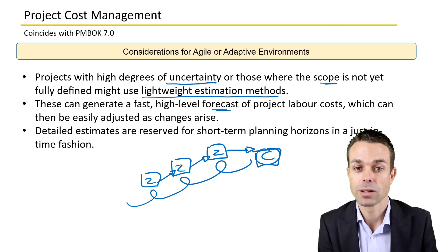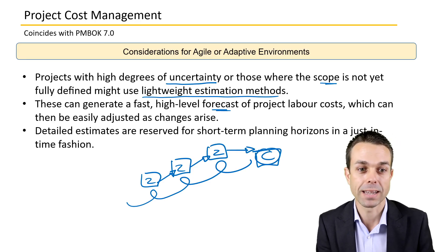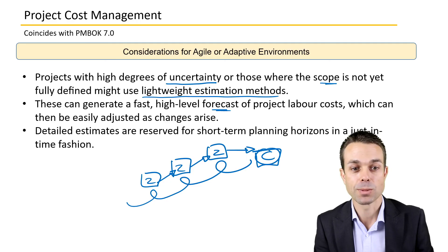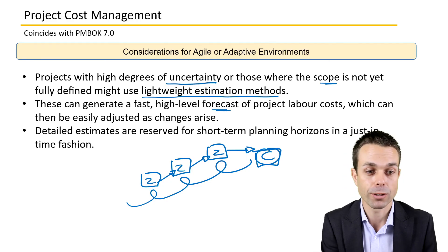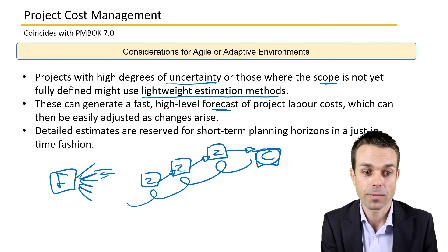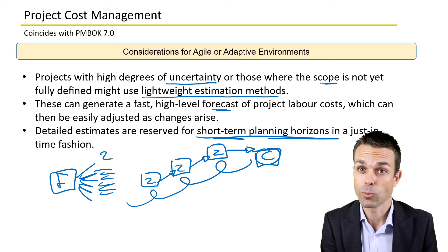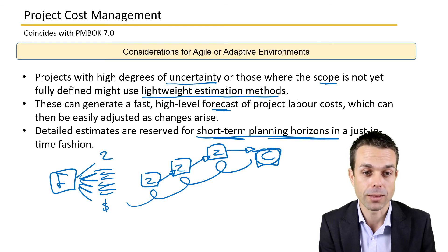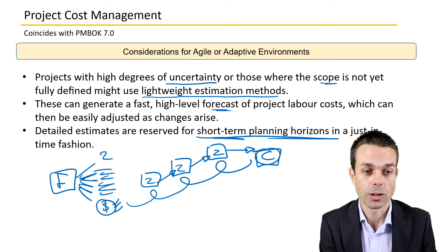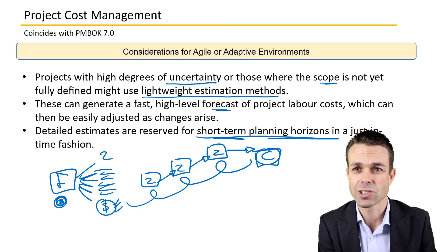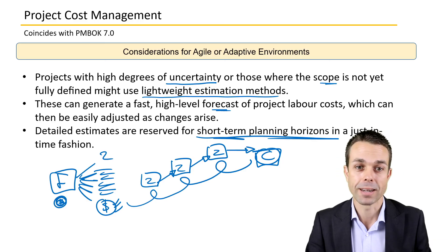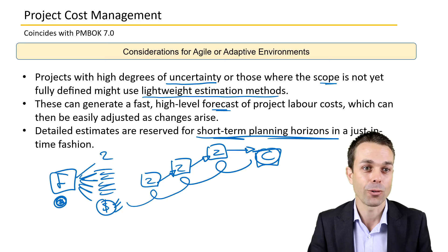This approach can generate a fast, high-level forecast of project labor costs which can be easily adjusted over time. Detailed estimates are reserved for short-term planning — just as we plan our activities in detail just before each iteration, we can do the same for cost. So for the near term we have a really good idea of cost, while further out it's just a high-level view. That's the way you work in an agile environment, and that is the overview for project cost management.